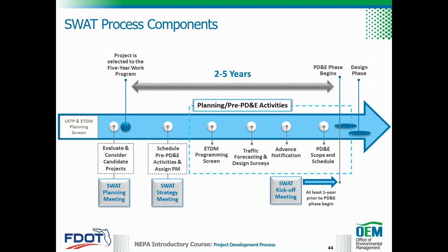interdisciplinary team meetings. The purpose of the kickoff meeting is to evaluate the preliminary project scope by understanding the project objectives and purpose and need, discussing project limits, reviewing context classification, reviewing project planning activities such as ETDM, programming screen, and feasibility studies, and more. Additional guidance is included in the FDOT SWOT training workbook.